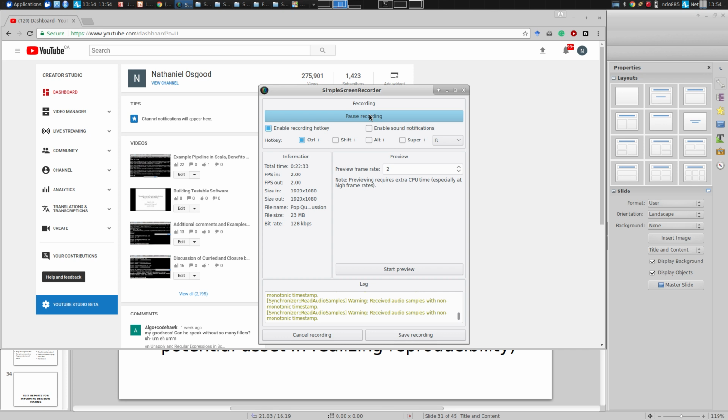There's two types of issues, though, that might fall under that general category. One is things that you identified before as risks. They just haven't, as we say, materialized. They haven't come about yet, and you're scanning for them based on your risk list.